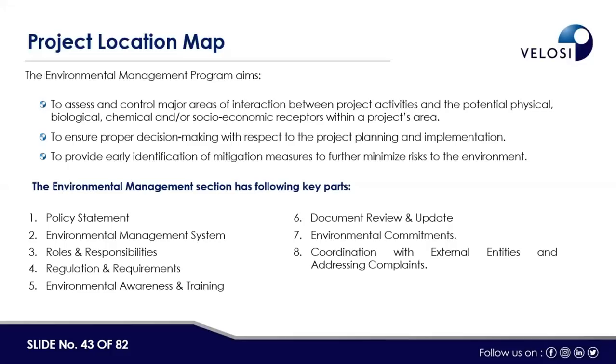Yeah. So another question is, without EIA, can we make an EMP for the project? Yes, it is possible that without EIA we can prepare the EMP. At the start of today's webinar, I mentioned that EMP is required during the operation stage as well. And at that time, I mentioned there are two scenarios. During the operation phase, the regulator may ask to submit an operational environmental management plan for a new facility. And there is another scenario, where an existing facility is already operating and there was no background of EIA. At that time, a regulator may ask to submit an OEMP as well, during the operation of the existing facility. So an EMP can be prepared without environmental impact assessment.